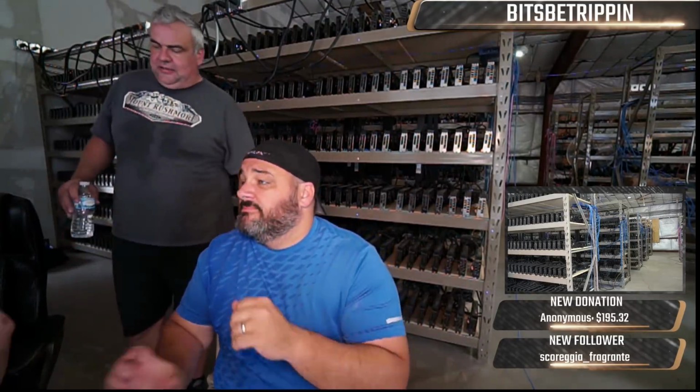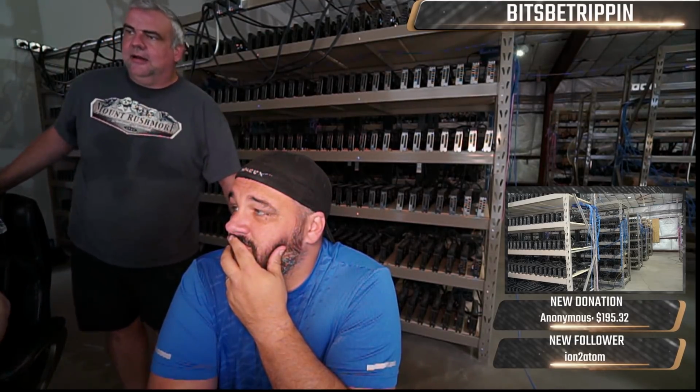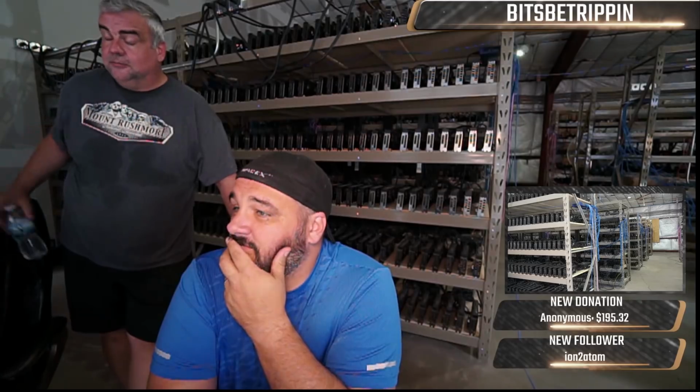All the rigs are on 220. Upgrading to 3,000 amp service was a feat. To give you guys an idea of what a project that is, I started the actual paperwork with my power company right before Thanksgiving, and I did not have that service on until, I want to say, the first week of April. So it was a 3 to almost 4 month process just to get 3,000 amp service installed.